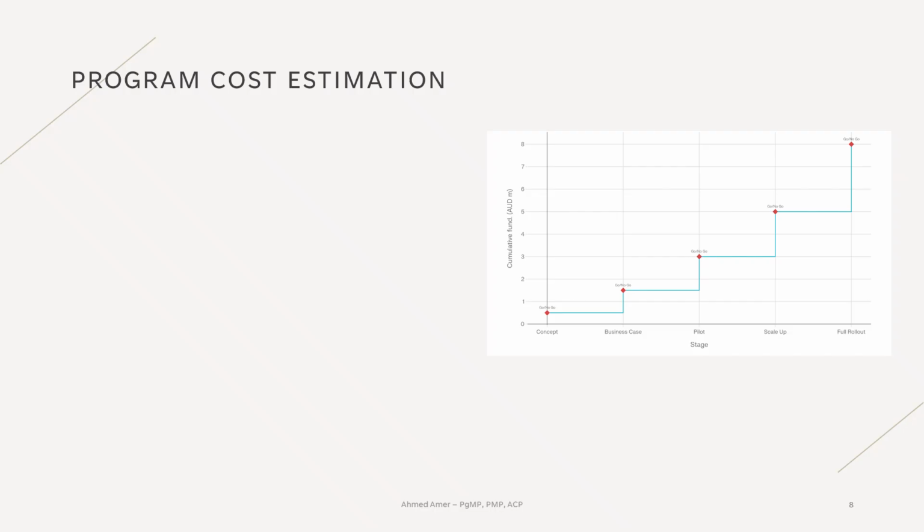When we build a program cost estimate, we're not just producing a single number. We often apply weight or probability based on the quantitative risk analysis and the complexity of the work. We do this to understand how confident we are in that estimate. Some organizations even use statistical techniques like Monte Carlo simulation to model different scenarios and get a clearer sense of the possible outcomes. That confidence factor helps define the range of potential program costs, not just a point estimate.